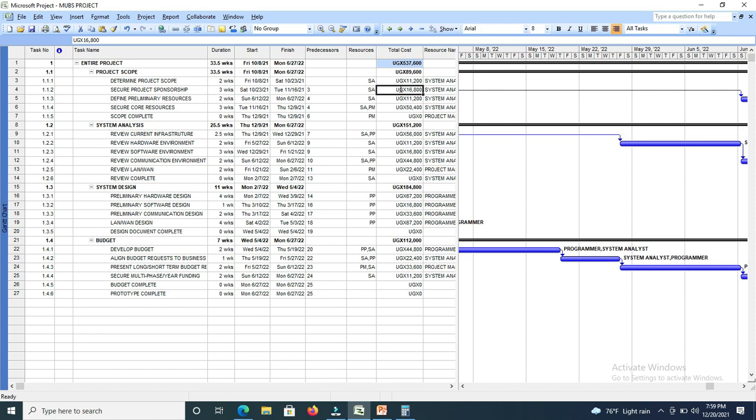So you get the money that this person earns in a day times the 7 days. That will be the money for a week. But this person is working 2 weeks. So 2 weeks, those are 14 days. Okay, so you get 14 days times the amount of money this person gets in a day.